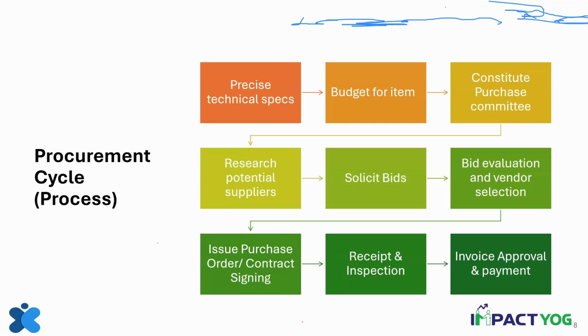Now, you might have a situation where you will first evaluate the technical proposal of that person. So that bid evaluation process will say, one, I will do technical evaluation of the particular proposal that has come, and I will only take the financial proposal of those who have qualified in the technical evaluation. So there will be a marking, and I will say out of 100 marks, those who qualify with 75 marks only will be taken to the next level in terms of opening their financial proposal. All those who have received less than 75 marks will be rejected at the technical evaluation stage.